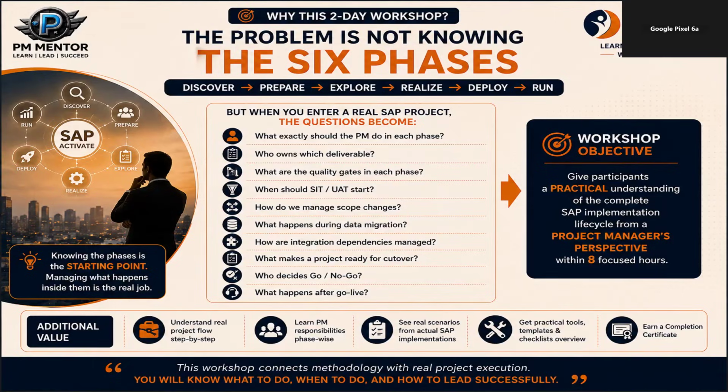Right? Now, look at the cutover. So, what makes a project genuinely ready for cutover? Is it enough that testing is complete? No. We need to look at solution readiness, data readiness, business readiness, training readiness, security readiness, a number of things you need to do for the readiness part and the cutover plan itself. Because cutover is where months of project work finally come together.